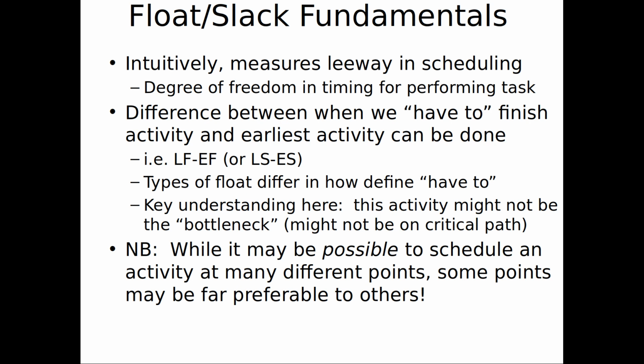This lower path, this guy was waiting for this guy to complete, right? That's why there's this difference here, right? He can finish by time 17. So if he finishes by time 17, he's going to be waiting for number 7 to complete. Do you understand that? So there are going to be some tasks like that for your projects where, yeah, it'd be nice to complete it early, but it doesn't gain us anything because we're going to be waiting for the UI to be done, or we're going to be waiting for this aspect of the requirements to be firmly in place or whatever.